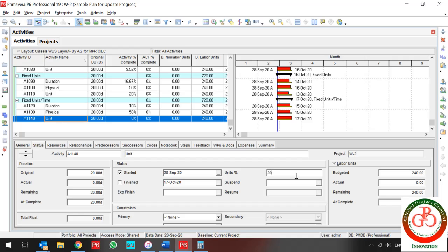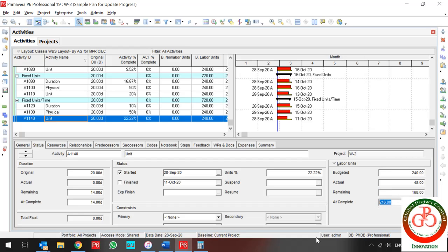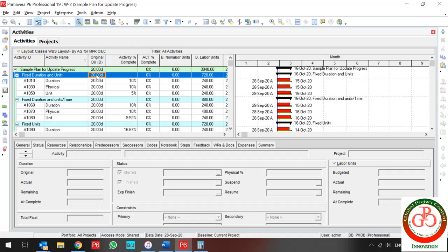For Unit percent complete type with Unit Per Time duration type, if I enter 20% progress, actual and remaining duration change automatically. But if I want to change the remaining duration manually to 40, the done work is fixed, remaining duration updates, and at-complete recalculates. My progress also recalculates based on my remaining duration.